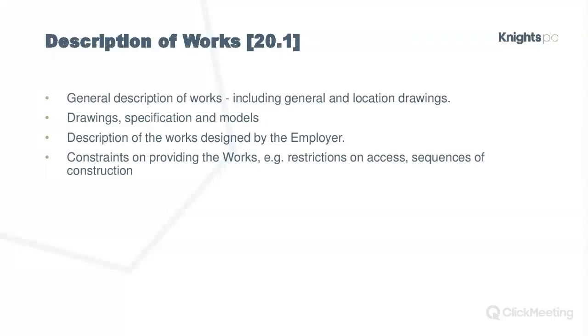So, if you're putting in a schedule of caveats, please make sure they're incorporated into the contract. So that's the first thing, but be careful how they're incorporated, because the next risk is that they're incorporated just as they've been prepared as a list, so they're not properly drafted. The risk is that they just get put in as a document. It's a document that goes at the end of a list, and therefore takes least priority over all the documents.